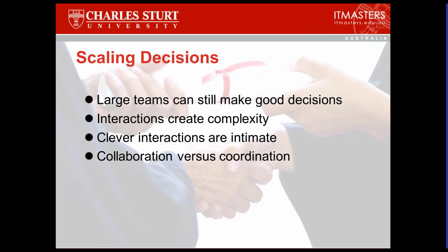And this raises the point that we did cover a bit in the pre-recorded about the difference between collaboration versus coordination. Coordination is simply a shared understanding of what's going on. It's just all being on the same page. We all know that that's what we're doing. The email copied to 100 people, that's coordination, because we all get the email, we all think, okay, well, that's what's happening. Collaboration is the contribution to the decisions.